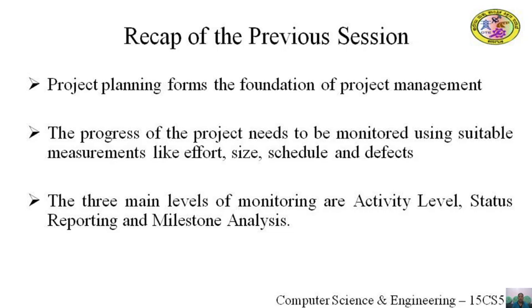The basic measurements that are needed are size, effort, schedule, and defects, for the sake of monitoring the current state of the project. A project can be monitored at different levels. The three main levels of monitoring are activity level, status reporting, and milestone analysis.